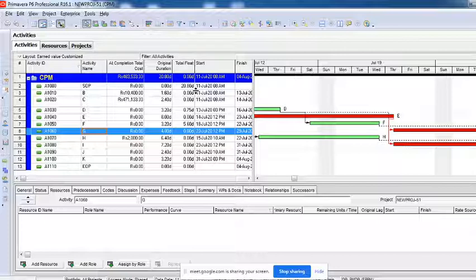You need not get the permission of the client in that case. So plans can change. In fact, they keep on changing. But baselines will not change, because your client does not want to compare to the changes you have made. Your client wants to compare to what you told me initially. So always the actuals are compared to the baselines, not to the current plan.